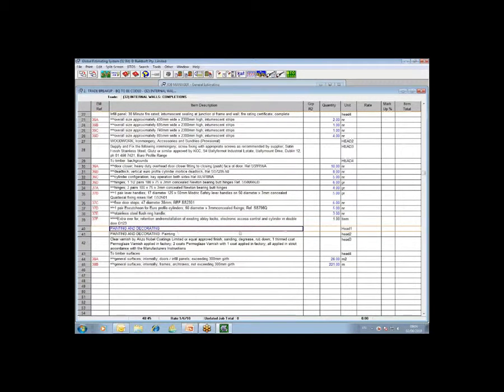Now, you'll notice that the last section here is painting and decorating. So naturally, what I'll want to do is send this section to a painting and decorating individual package. So what I'm going to show you here is how you can use the rate build-up sheets to code multiple items into various packages, and then also in the same section, internal walls completion, code on level 2 an item individually to a different package. So I'm going to put this item, painting and decorating, to the painting package.